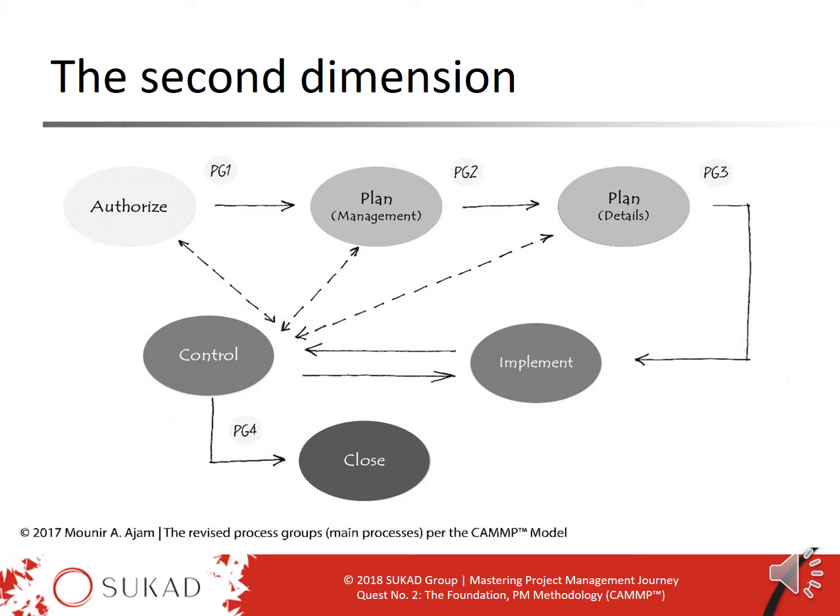So once again, at the project level, we have a project lifecycle, we have stages, we have stage gates. At the phase or stage level, we have the processes, and there are the 6 processes here. Each one of them will include many steps, and at the end of that process, we'll have a process gate. Once more, these are applicable for medium to large projects. On small projects, we can skip them, they are not essential.